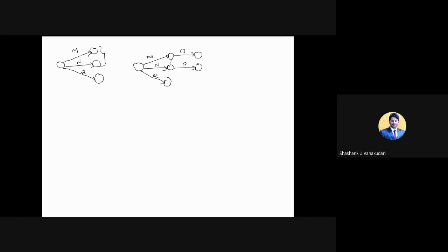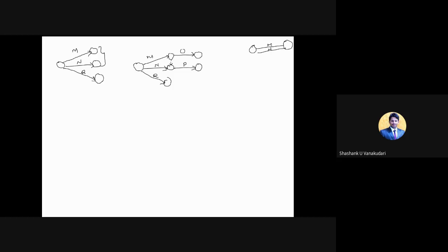So dummy activity, I can denote it by dotted line. So by using this dummy activity, just satisfy the condition now. So now O and P are starting concurrently, means by using this dummy activity, they are starting concurrently now. So it's like a single node now. But you cannot show the single node here because two activities are reaching at the same node and they are starting at the same node. It is not possible like this. So you cannot give M and N activities for the same node. So this is entirely wrong thing.